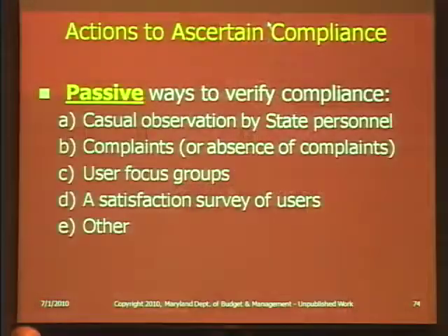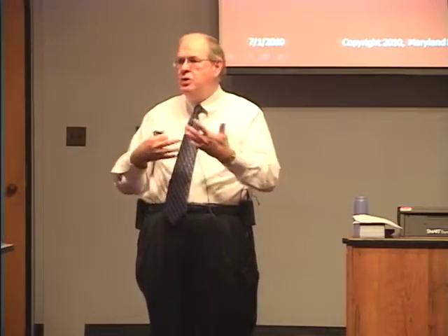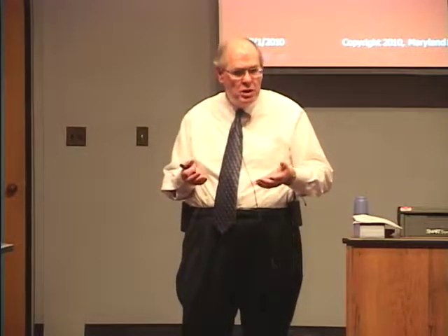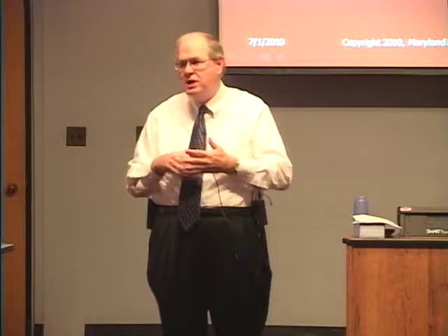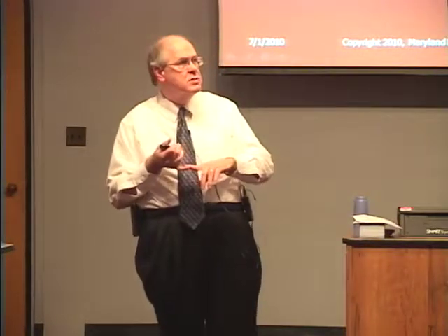Complaints we've talked about. Focus groups. If you're serving thousands of customers, you can have two, three, four focus groups of appropriately selected people and have their comments be representative of the comments of thousands of people if you have selected them properly in a scientific manner. And if you have someone who is skilled with focus groups and how to elicit the comments and reactions of people, you can get a lot of benefit. So that's one thing that can be specified.